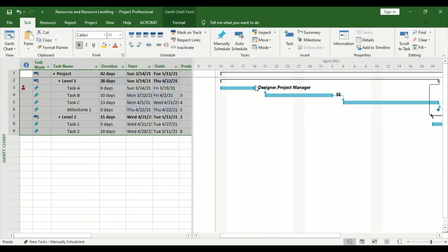This is about relationships. We shall cover something all about this. Yeah, but this one means when this one gets done, that is the finish, then this one has to start. So the relationship between them is finish to start. There are some tasks that will wait for a particular task to start, then it also starts. So that is a start to start. Yeah, but this one is finish to start.